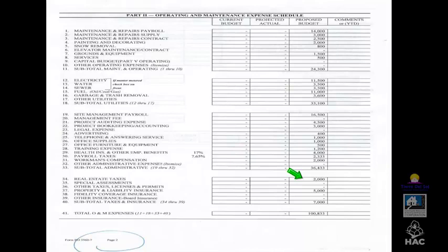Just some things I want to cover here: remember that Davis-Bacon wage rates apply, as does Davis-Bacon monitoring. We are very aware that a lot of times the contractors might be paying more than the Davis-Bacon wage rates, but that does not exempt the contractor from completing the Davis-Bacon payroll reports and meeting all the requirements of Davis-Bacon.